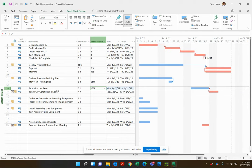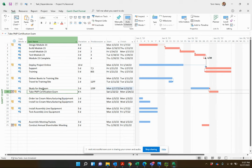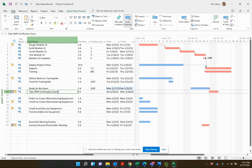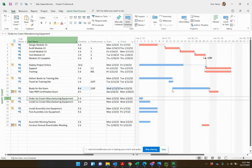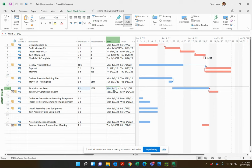Now we can see we're studying for the exam and then taking it. You might wonder why not just link studying finish-to-start to taking the exam. The reason is backward planning: if I decide I need eight days of study instead of five, Microsoft Project tells me I need to start sooner. That is the beauty of Microsoft Project — it tells us the dates. We give it knowledge and logic, and the scheduling engine provides us with the dates.